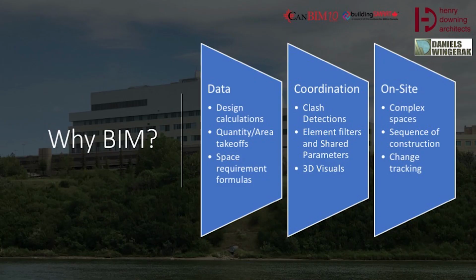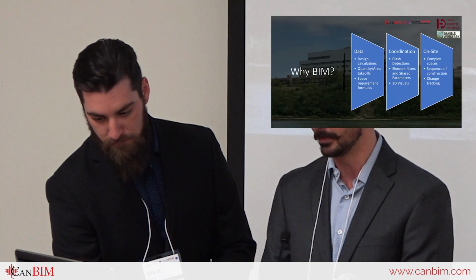As the design phase came to an end, we started focusing on the accuracy of the model because we knew it was very important to really show the benefits of what BIM is. Once confident with the model, we paired this information with our own historic data to more accurately estimate the cost of the construction. Just a little note here, we weren't off by very much with our historic data from past projects. I can't remember the exact numbers, but it was pretty impressive how close we were to what the anticipated number was through historic data. So it was definitely beneficial to help stay on budget.